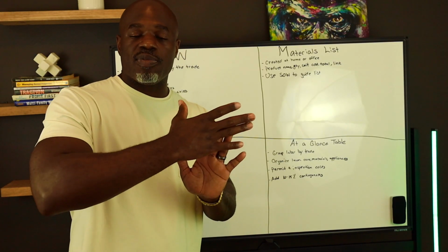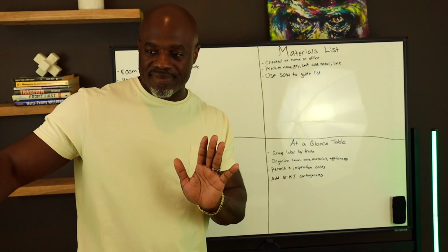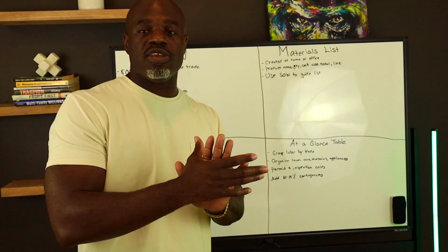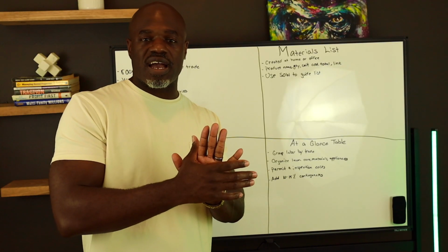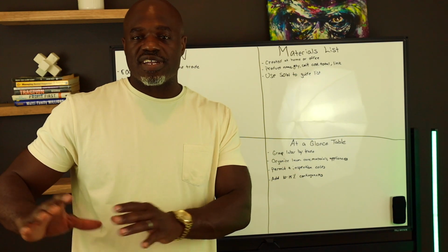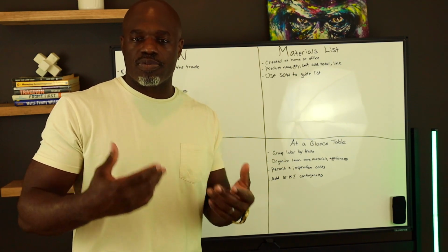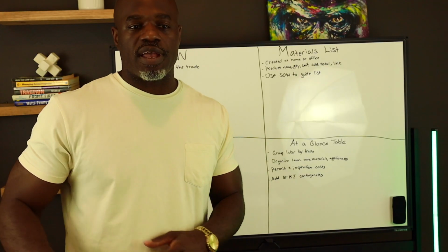I love keeping the scope of work the first priority. Let's get through this. And unless any of these other findings are keeping you from completing the scope of work items, let's focus on the scope of work. And then any unforeseens or anything that came up, just write that up. That'll be a change order. We'll both review it, we'll approve it, and then we can hop on that.